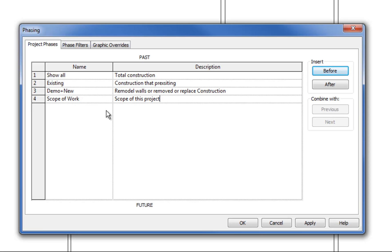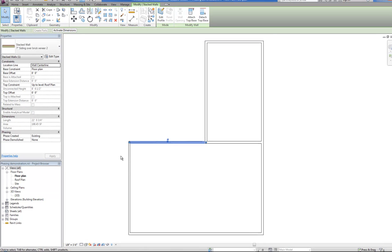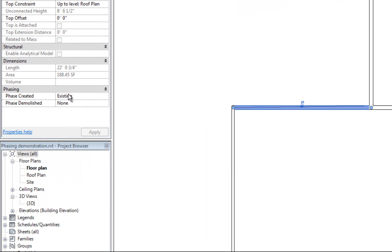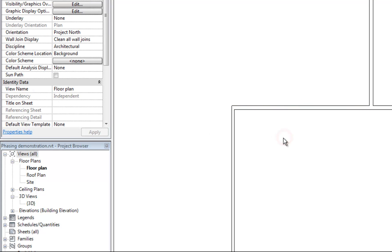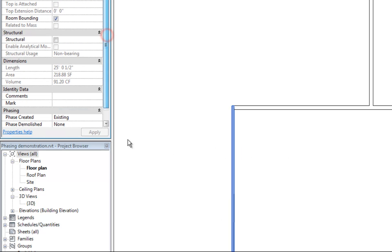Now that I've relabeled that, we can sort the objects in the plan based upon which phase they belong to. I'll hit OK and then select a wall to decide which phase applies for when it was created and which phase applies for when it's demolished. Any wall that is not going to be demolished you leave the demolished phase as none. These existing walls to remain have phase created set to 'existing' and phase demolished as none.